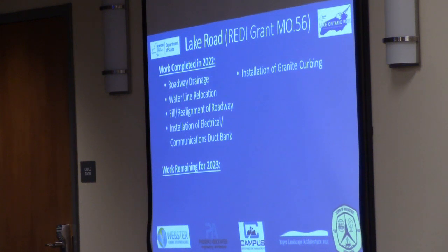That's what's allowing the power and communications lines to go underground through the park section. That was energized, I believe, last week. So you'll start seeing that getting further along, and those poles on the south side along the bay will start coming down. So installation of the granite curb, installation of base and binder courses of asphalt, which allowed us to open the road.